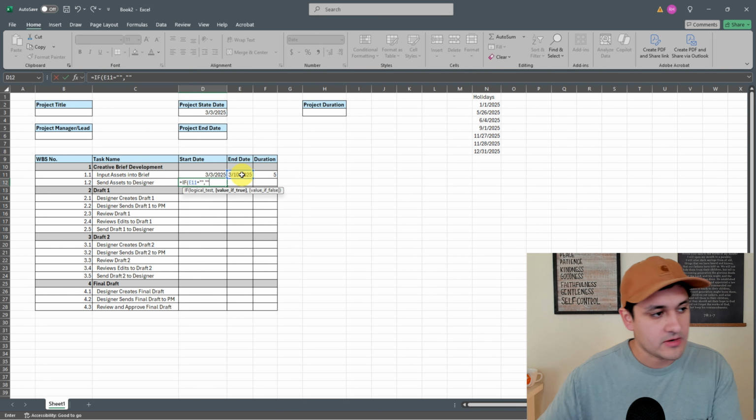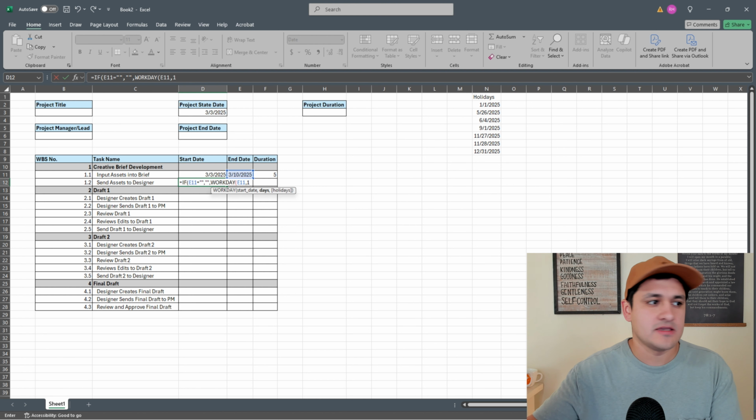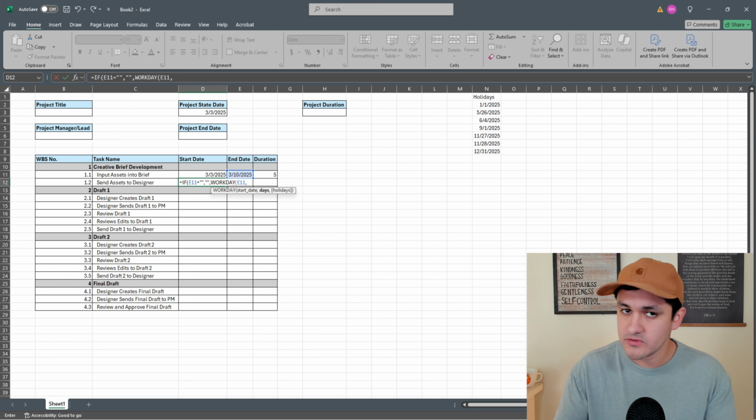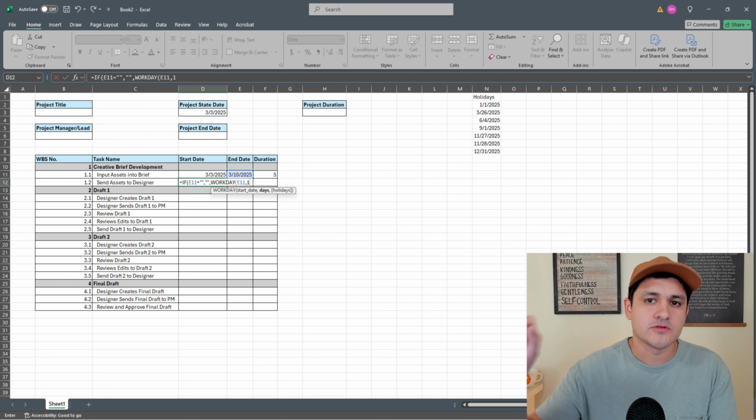I'm actually going to select this. It's going to be 1 because I just want to add a date. This is going to start a day after my end date. Now you can do same day, and you can say 0 if you want, but just for simplicity, I'm going to add a day after my end date here.